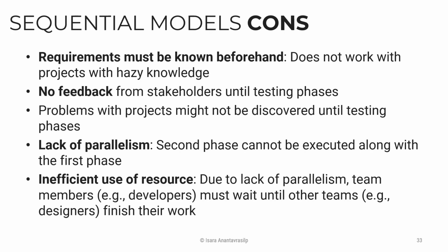That leads to the last one, inefficient use of resources. Due to the lack of parallelism, team members, developers, and SAs must wait until the other team finishes their work first, and that is a waste. And you might be asking, what do they do? Because the waterfall model has been used for a long time.